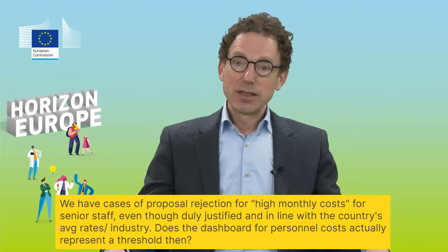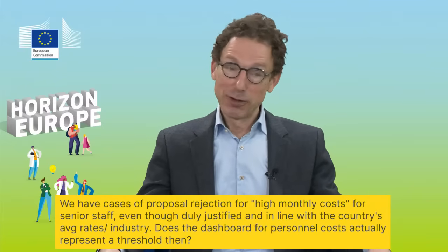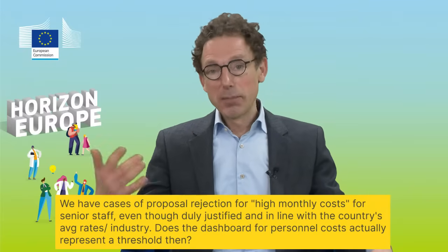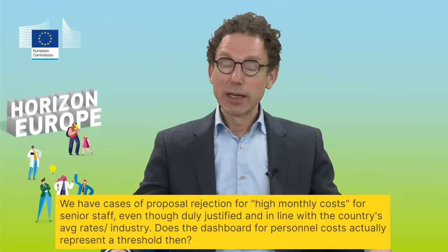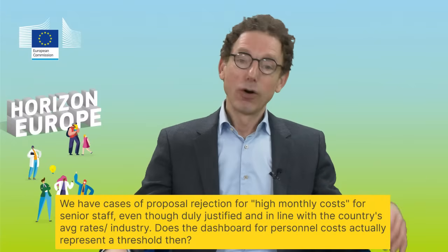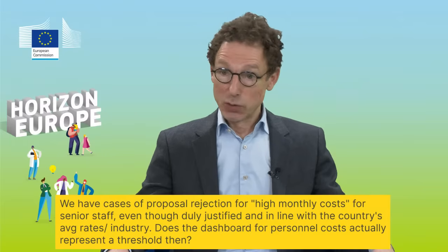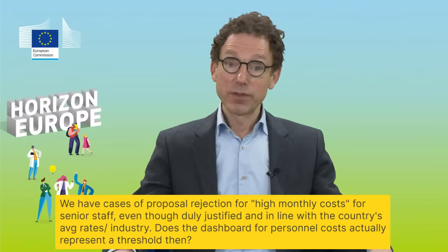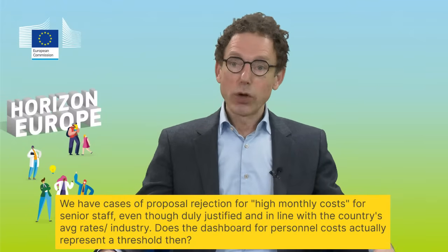But the mere allegation without the details, we can't solve, and we can certainly not solve here. Maybe bear in mind that personnel costs are not only a result of the monthly rate that you apply. Of course, the other effect is the amount of resource. So how many person months of this full professor are you charging? And is it clear from the proposal that indeed all this work time of the senior professor is needed?